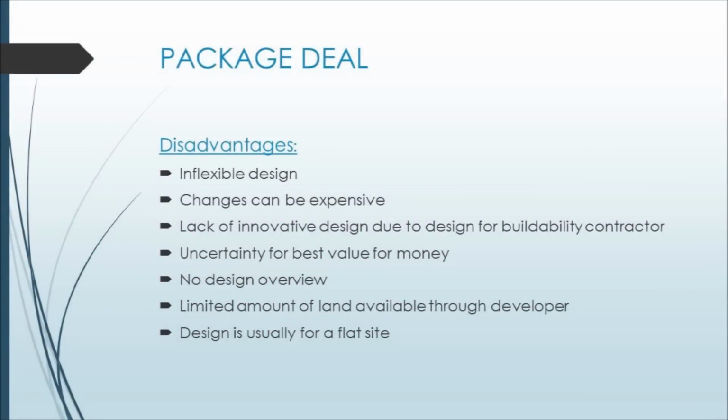Unfortunately, if you are looking for a unique design, this would be hard, as this method is inflexible to design changes. When changes are made, it could become rather expensive and time consuming. These house designs usually lack good architectural aesthetics, and the design is driven for good buildability for the contractor. Using this method also doesn't mean you get the best value for money, as there is nothing else you can compare it to. This could also lead to lack of quality, as there is no one overlooking the project.